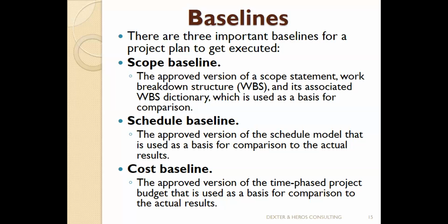You must sign that part of the plan where you indicated how the work will happen, the schedule. You must sign that schedule baseline. Also, your costs, the way you allocated them to each activity and the total, must be approved. In practice, I said that when changes happen to the plan, because it has been approved, get an approval from the sponsor before you make those changes.